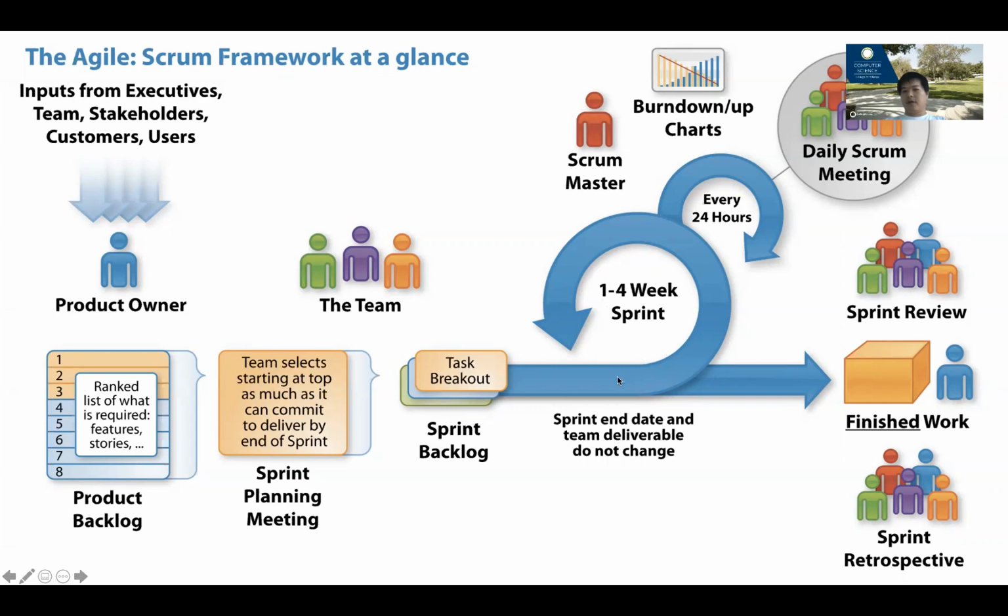During that cycle, all the developers start to work together and make the changes and try to finish the list on time. And after that, we will actually deliver the version to the customer, whether it's a demo or maybe I can just deploy that, they can start to use it right away. And then I can start to receive feedback and do some review. At the same time, I'm going to move to the next cycle with another 2 or 3 or 4 weeks. And at that time, I will need to pick some other features to work on and then do this kind of iterations one after another. All right. So that is called Agile development.